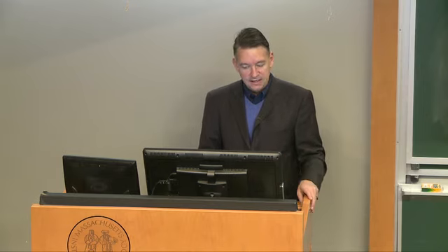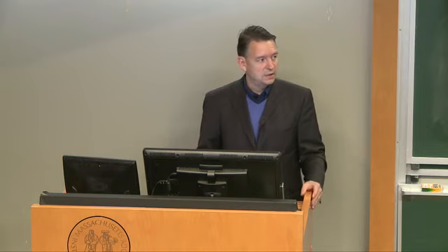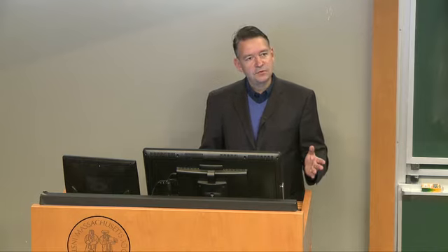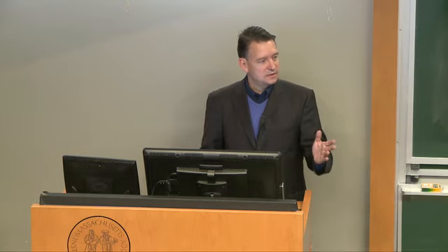And so phase D is intense, it's expensive, and if something goes wrong, it often sends you back to the drawing board. You have to figure out whether a failed test, a failed verification, is a showstopper. If it is, then you have to redesign the system and retest.